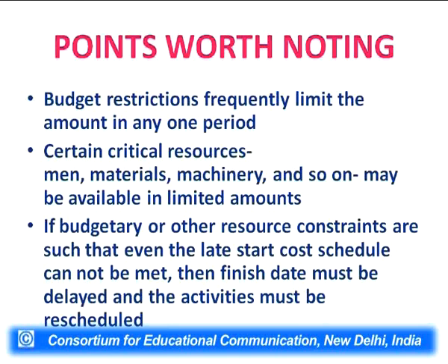If budgetary or other resource constraints are such that even the late start cost schedule cannot be met, then the finish date must be delayed and the activities must be rescheduled. That is the only way to take care of limited resources.